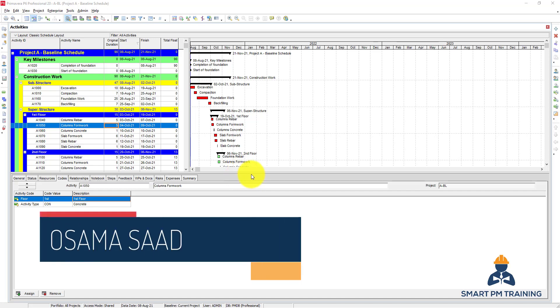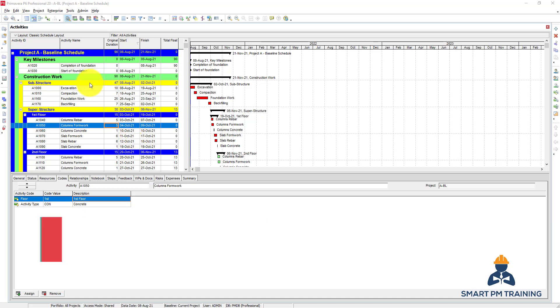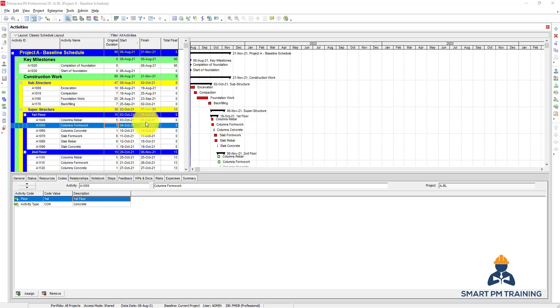In this video I will explain how to maintain and assign baseline. This is the program we have right now, this is our baseline, and you want to update this program. You want to assign the original baseline schedule to compare the progress and see where you are right now - are you ahead or behind?